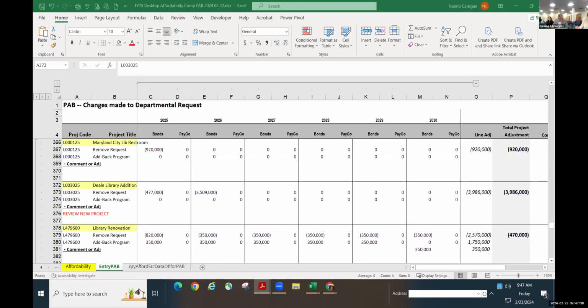So my statement would be, on our paperwork for 5 years it shows 21, but that's really 41 million for the 6-year total. Next year, that remaining 18 million will come online. We just don't see it in the budget book because we don't plan out to fiscal year 31. We go out to only 5 years in the program. We talked about the Norrisville Library, a new library in Norrisville.